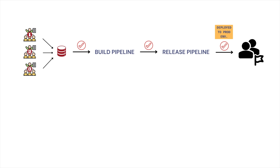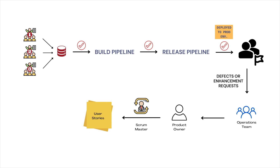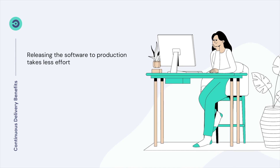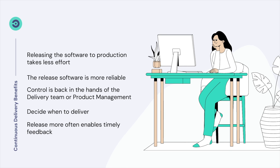Once deployed to the production environment, the software becomes available to end users. Defects and enhancement requests from users are recorded by the operations team and communicated to product management — in our case, to the EasySoft product owner — with the help of the scrum master. The product owner converts these into small bite-sized user stories, which are prioritized and merged into the product backlog for a future sprint. With continuous delivery in place, releasing software to production takes less effort, happens with minimal human involvement using automated and repeatable pipelines, and is more reliable. Continuous delivery puts control back into the hands of the delivery team or product management, and allows more frequent releases that enable early feedback for timely improvement.